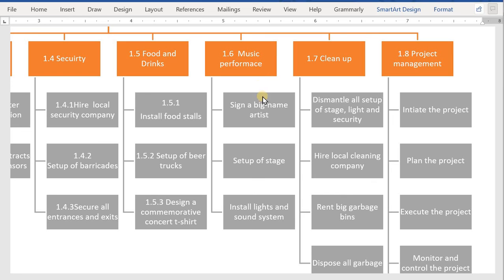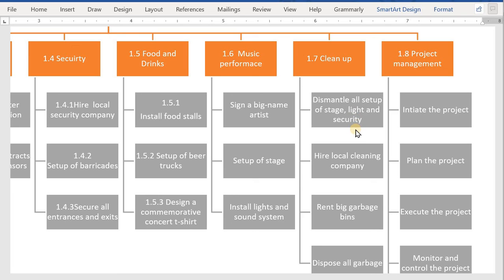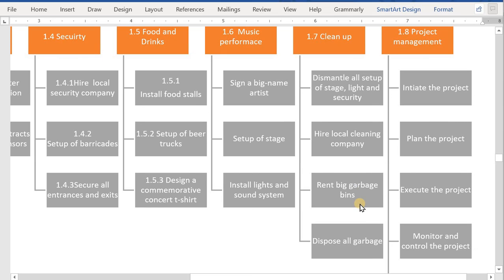For music performance, we will sign a big name artist, then we will set up a stage according to the requirements, then finally we will install lights and sound system. Then after hosting all the concert and finishing it up, we need to clean the site, in which we will dismantle all the setup of stage, lights, and security, all the barricades. After that, we need to hire a local cleaning company. Also, we need to rent big garbage bins so we can dispose all the garbage at the proper site.